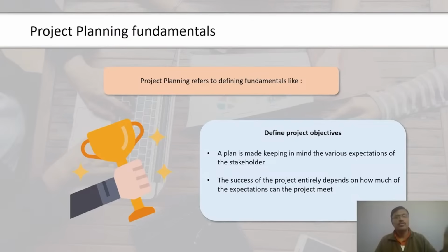For example, it was planned as part of quality management that project would get completed plus or minus 10% within the cost budget. 3 months back when the measure was done, project was over budget by 20%. When the measure was done the day before, it was only 15% over budget. Therefore, the project has shown an improvement of 5% in the last 3 months, and it is quite likely that over the next 3 months, project may get within planned limit of 10%. Instead of showing improvement, if data shows cost increase, then corrective and preventative actions are required to get a project within the 10% limit. This is quality control.